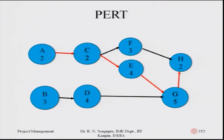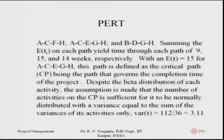I have drawn the graph based on the precedence diagram — note that two nodes start, which should be avoided. The red line joining A to C, C to E, E to G, and G to H is the critical path. The paths are: A-C-F-H, A-C-E-G-H, and B-D-G-H. Summing expected values on each path yields durations of 9, 15, and 14 weeks respectively, with A-C-E-G-H being the critical path at an expected value of 15 weeks.